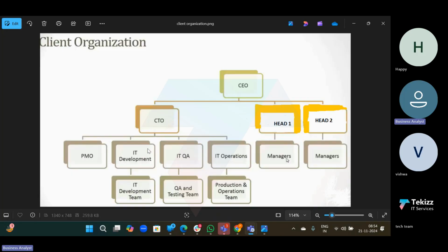Based on predefined criteria, Bank of America will prepare a detailed request for proposal document. In that RFP document, they will include specific requirements like what technical specification they need, what the expected deliverables are, and what the evaluation criteria are for selecting the most suitable vendor for this project. They also outline the timeline of the project, and the submission and clarifications. All those things are in that document. What is the name of this document? It's the request for proposal. So they will create this request for proposal document.